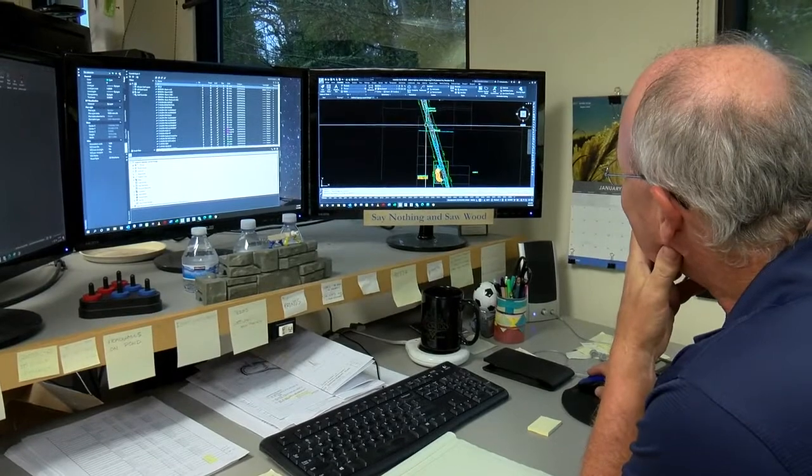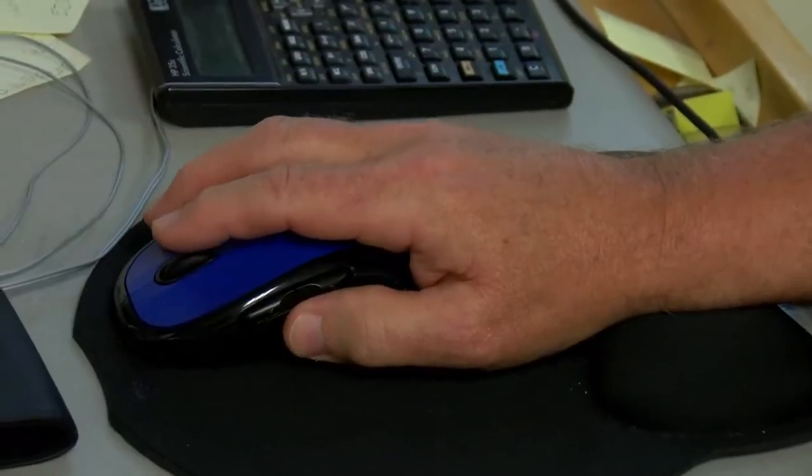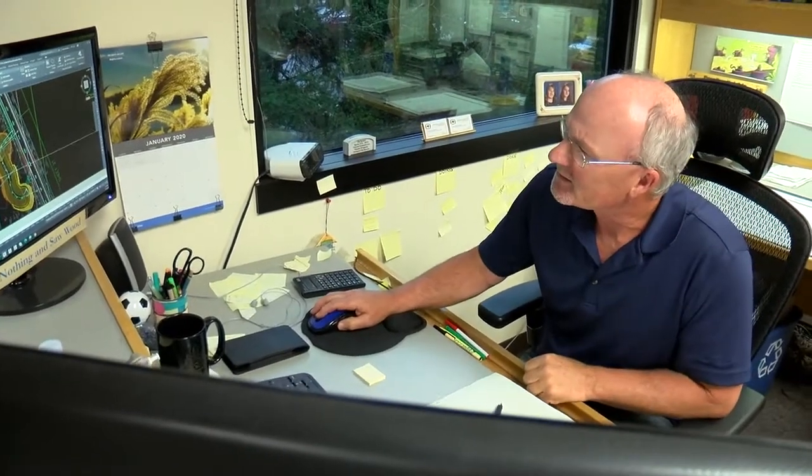Wow, okay. So you get through design, and all the various parties involved kind of give their blessing to proceed. Right. And so what's one of the first things that needs to be done? That's a good question. As we back up to the start of design, it comes to the project manager. He will need to have a design team. In this case, we need to select a consulting team. We have inside design staff that also does our projects. In this case, we had a consultant. So we selected the consultant, and then we need to have survey. We really can't start design until we have survey. So Ken Swineman, our lead survey supervisor, could probably go through the process of what they do to get the data that we need to actually start the design process.